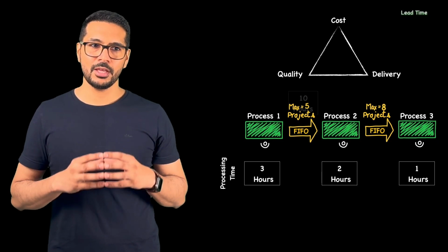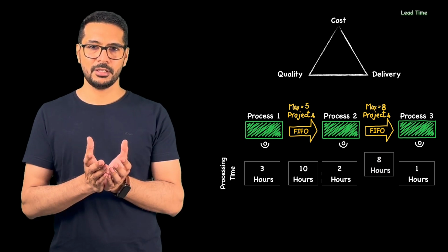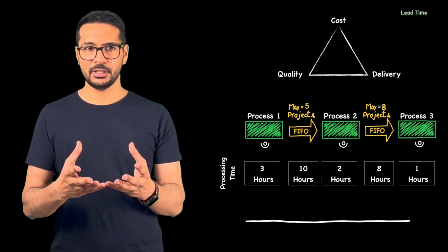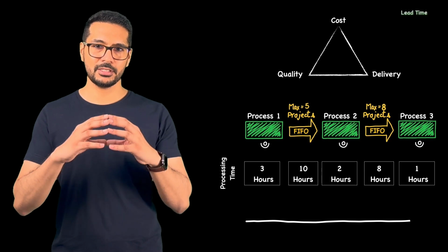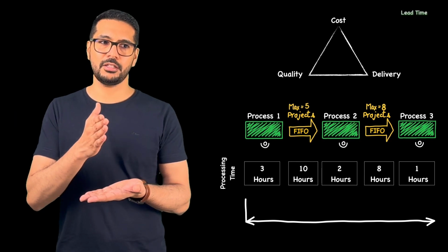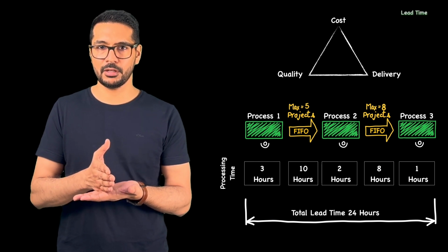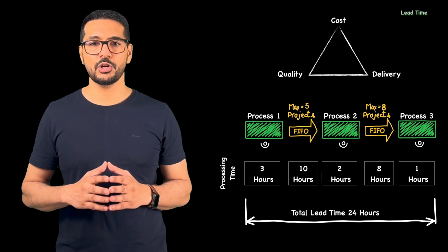we know that the time to process these parked tasks is definite. It could be 5 hours, it could be 8 hours, depending. But we have a consistent number. So if we sum up all the processing time and the parked work or the working time in buffer areas, we come up here with 24 hours of total lead time.